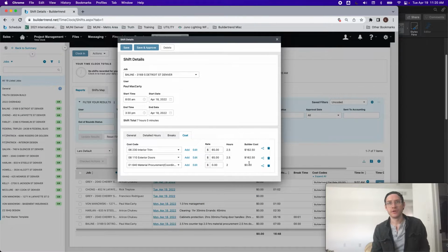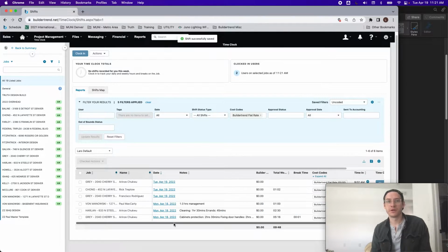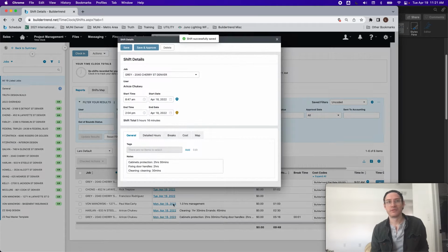You'll notice that once the hours are applied to a cost code, it modifies the rates. So all of our management fees are collected currently separately. So everything's management. So there's a management cost code, procurement, cleanup, job site cleanup. Those are all rated at $0 an hour. So once I hit save, this will disappear from my list of uncoded. And we got rinse and repeat.